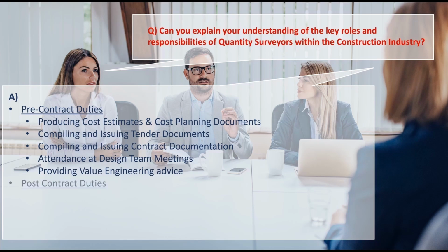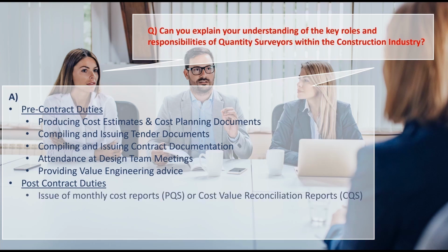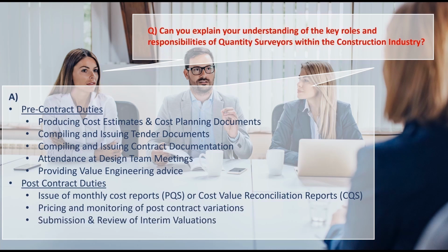And typical post-contract duties after the contract has been signed and the job has been started will include the issue of monthly cost reports for professional quantity surveyors to the client, or cost value reconciliation reports for contractors quantity surveyors. It could also include pricing and monitoring of post-contract variations, submission and review of interim valuations, and the negotiation and agreement of any final accounts.